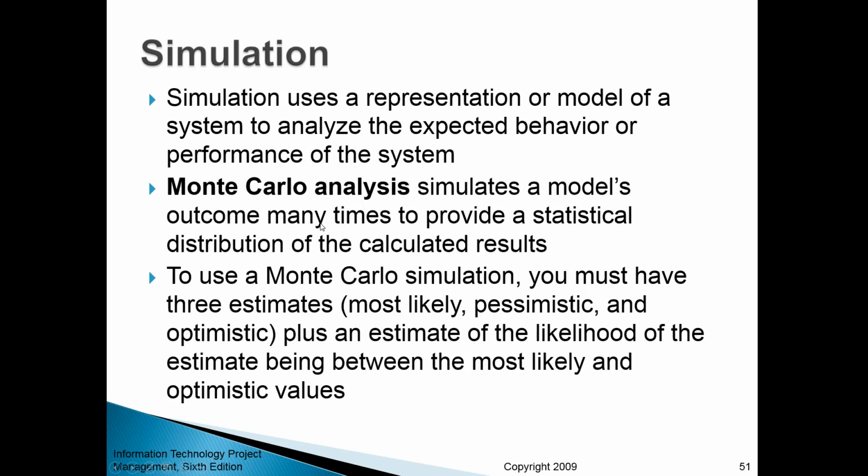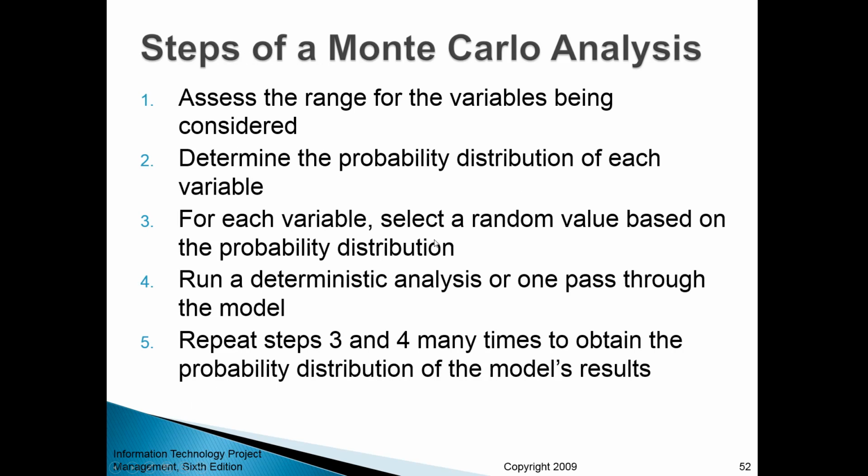You spin your roulette, and based on that spinning, you get certain values of variables based on underlying probability distributions, and then you plug those values into your model, and in our case it's the model of the project, and it gives you some kind of numerical value. Just like in a casino, you play over and over again. You estimate those values of variables, you plug them in, you generate output based on your model, and then you create a probability distribution for the entire project to have a better understanding of all the possibilities and their likelihood. Okay, so here we have those steps.